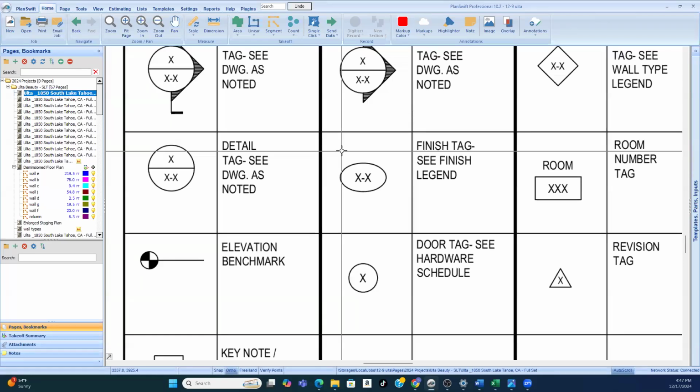The window person has to look at the exterior elevations and count how many windows they have, because there is no full window schedule for a full project like there is a door schedule. All the doors have an individual number, from one to whatever. But the windows, no. It's window A, window B, window C, even if there's a zillion window A's.